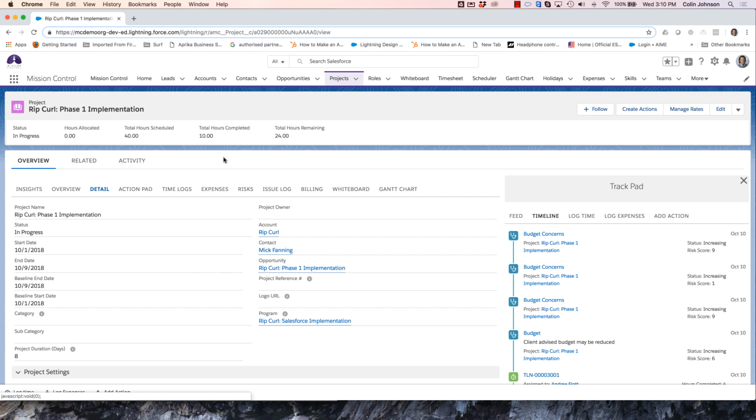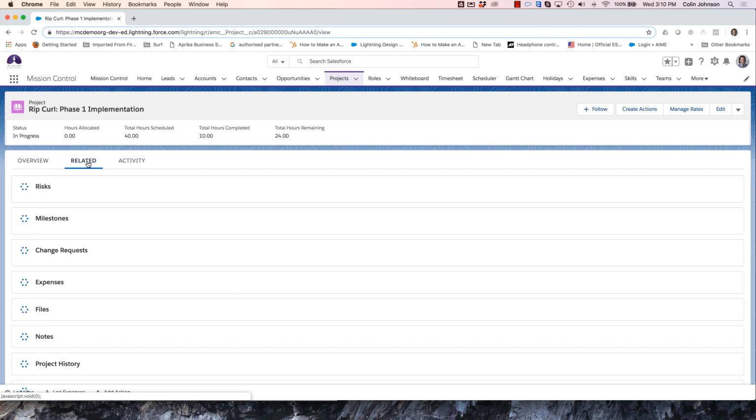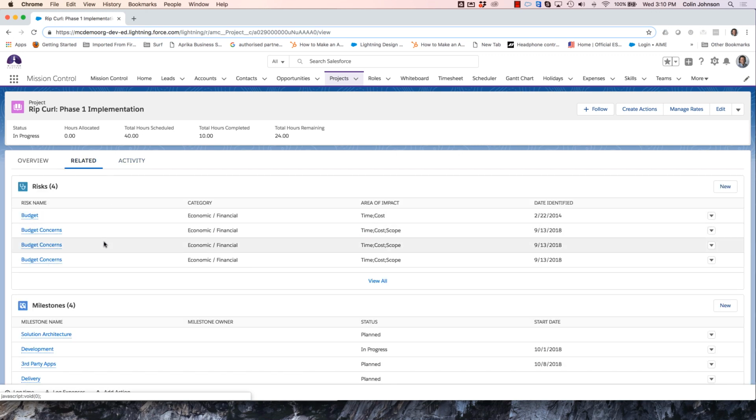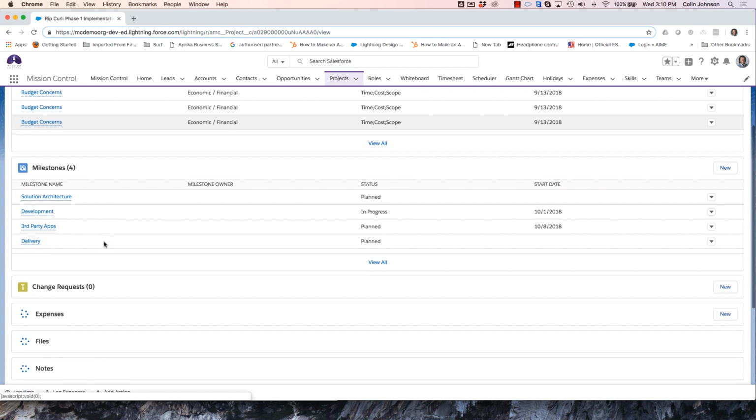Now, let's say a scenario happens where Ripcurl come to us and say they need to add in some additional scope for this phase one project. They can't wait till phase two. So unfortunately, we can't absorb that. So what we're going to have to do is charge them some additional fees. So we can go off and create our opportunity, close win that, and then once that opportunity is in the system, we can come through and create a change request linking that additional opportunity to the project.